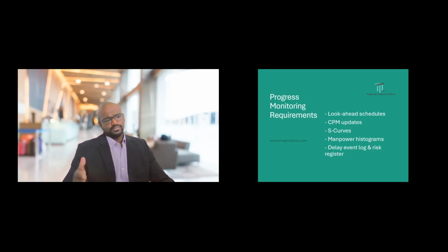Delay event log is the most important thing that has to be maintained side by side, so that it will be the input for the delay analysis and the EOT claim later. And always the schedule should have an integration with the risk register. Most contractors do not follow this. Major contractors, MNCs follow this, and major projects have requirements to follow a risk register.